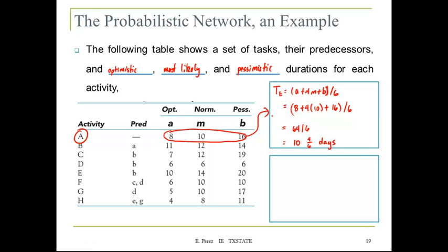We can also estimate the variance. So for this case, I'm going to use the 99% formula. So we have B minus A divided by 6. The formula we got was for the standard deviation. So if I want to compute the variance, what do I do? Anyone? Yes. You have to power to make a square. Okay? So it's not the square root, it's make it to the power of 2.